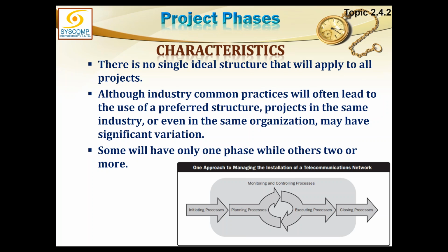Although things might be improved further, we don't want to improve them any further beyond what is required by the project. So this cycle will continue improving the product until it meets the required requirements. And once it has done that, the product is in a deliverable shape. It should be presented for user acceptance and then finally accepted. If it is accepted, the project is finally closed down. All the assets are handed over back to the organization. All the lessons learned are recorded, and the project is no more. There is nothing left in the project.